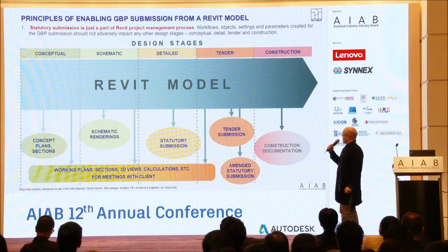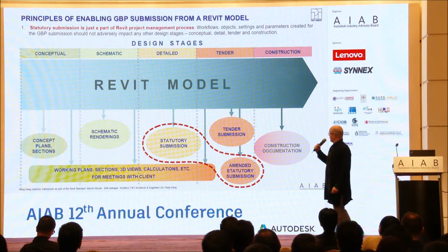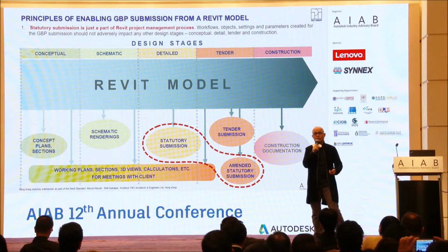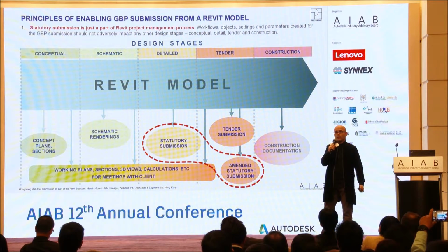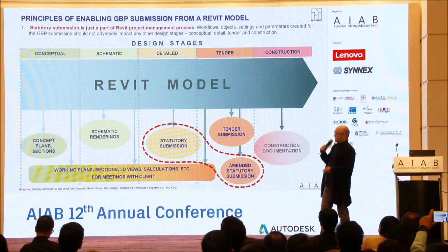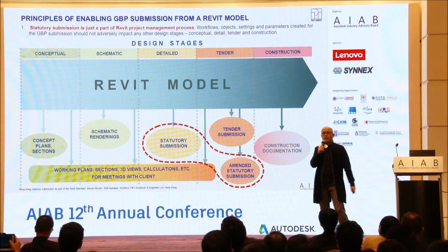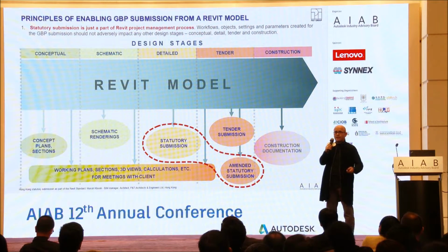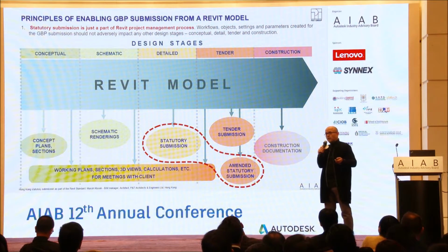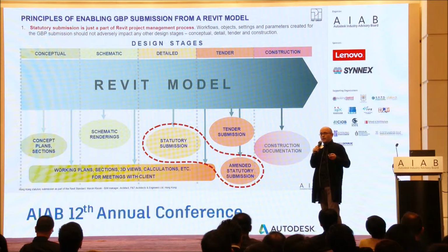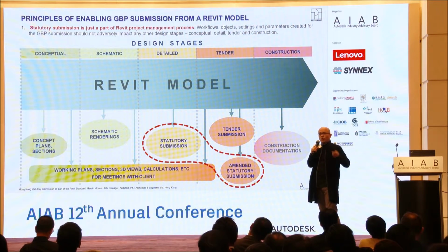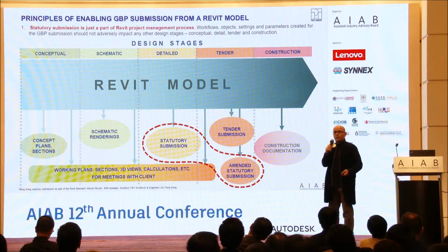The fact that we need to have the ability to produce statutory submission more than once during the design process, and it can be more, it can be amended, first amendment, second amendment, means that we cannot just produce statutory submission with all the settings and forget about it. We need to keep this availability of statutory submission generation all the time during our project.